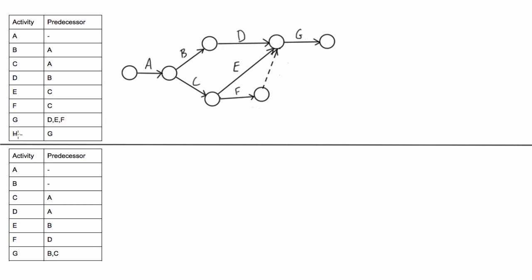So next we have to do is just draw an activity H. And then the last thing we need to do is we need to number each node in a way that every arrow points from a lower number to a higher number. So I would do it this way. This way we can use these numbers as what's called a unique ij number to identify our activities as an alternative to using their name.